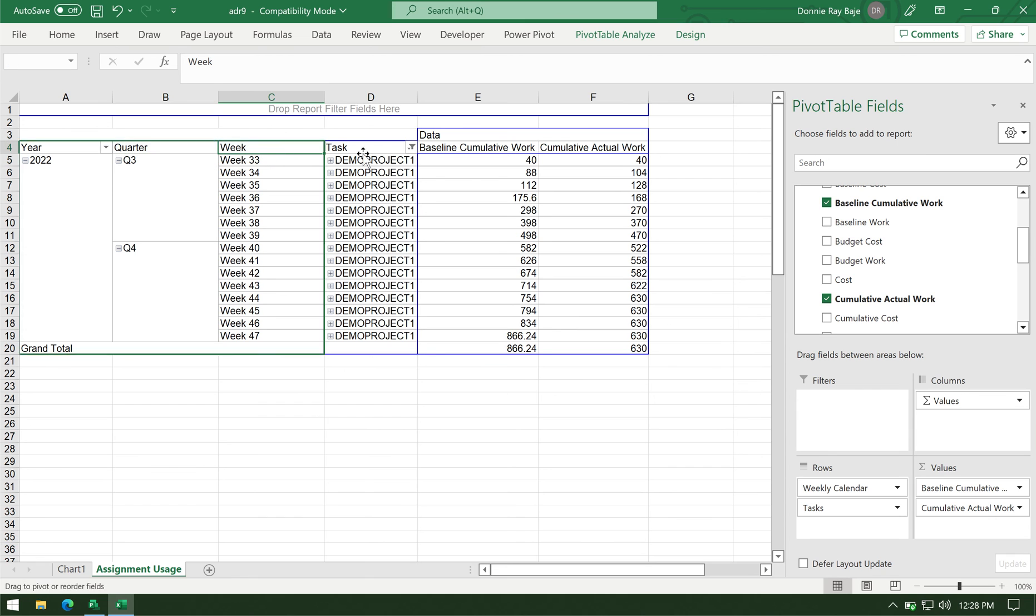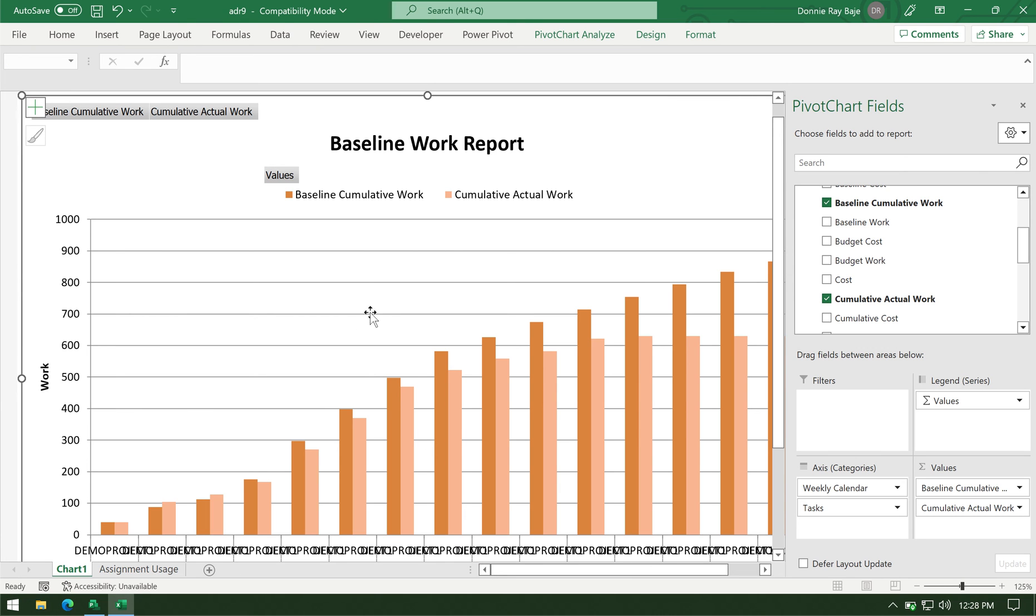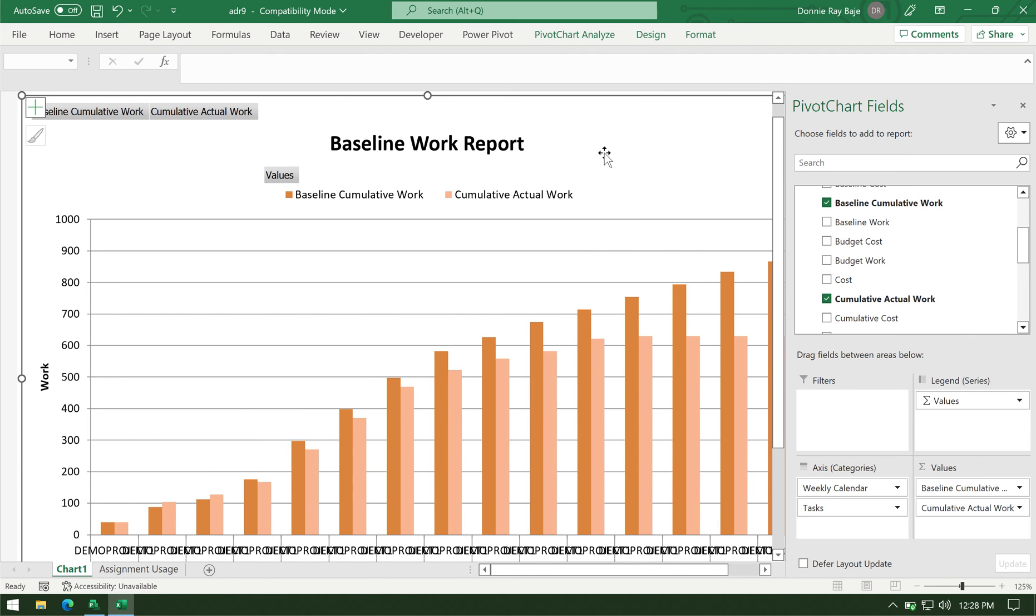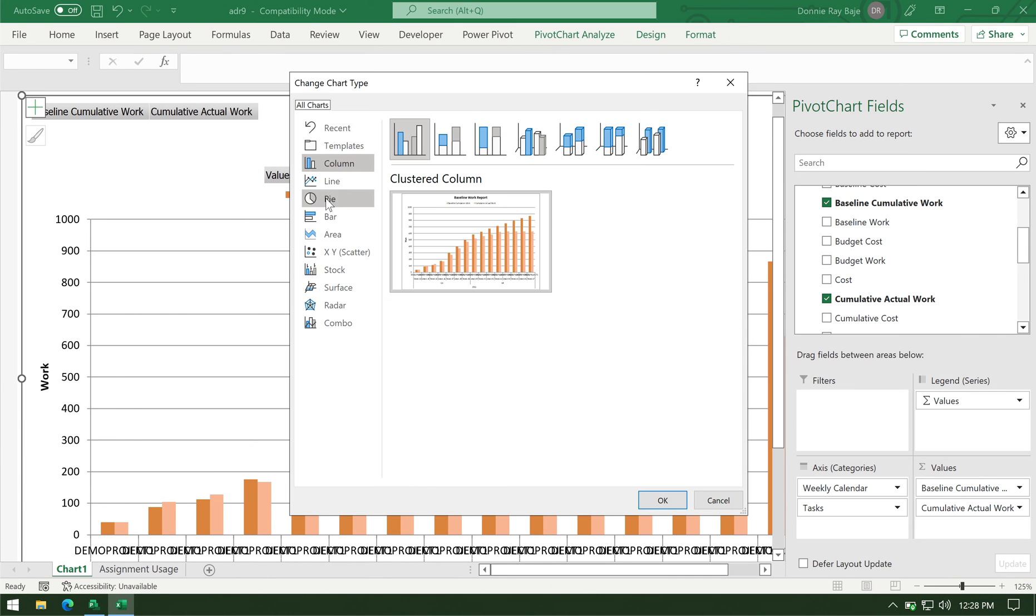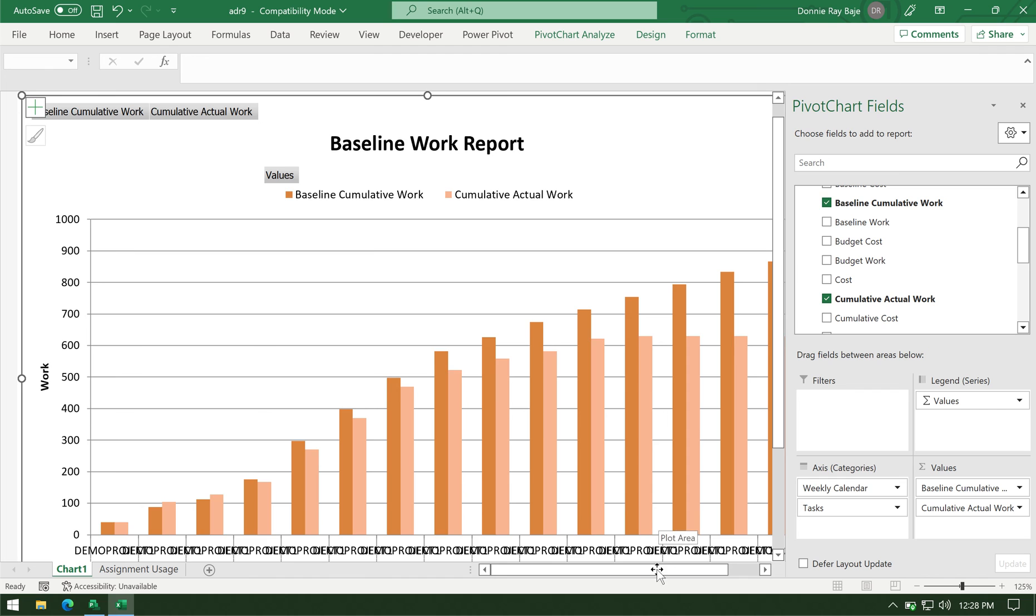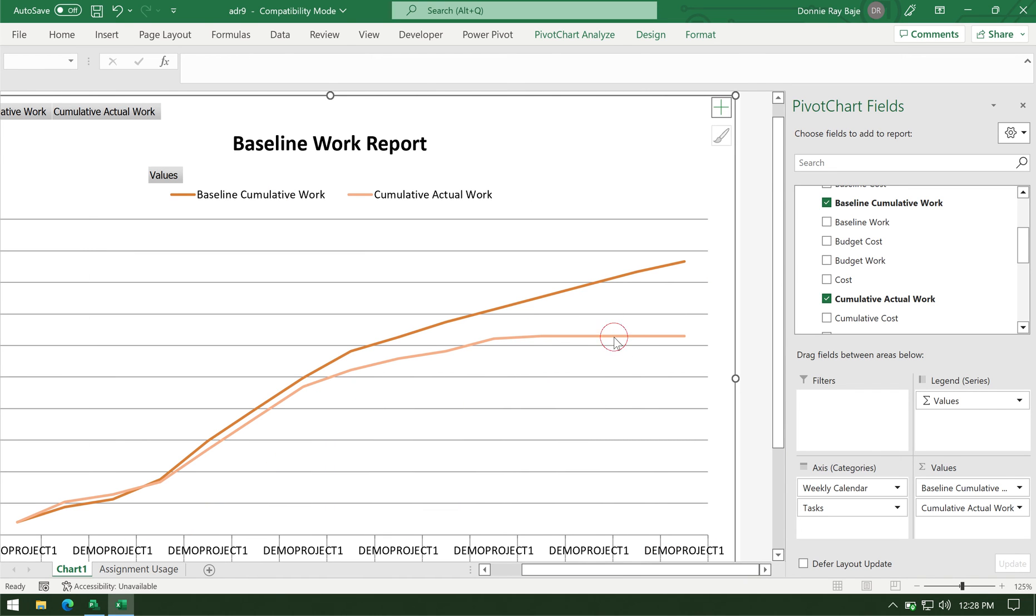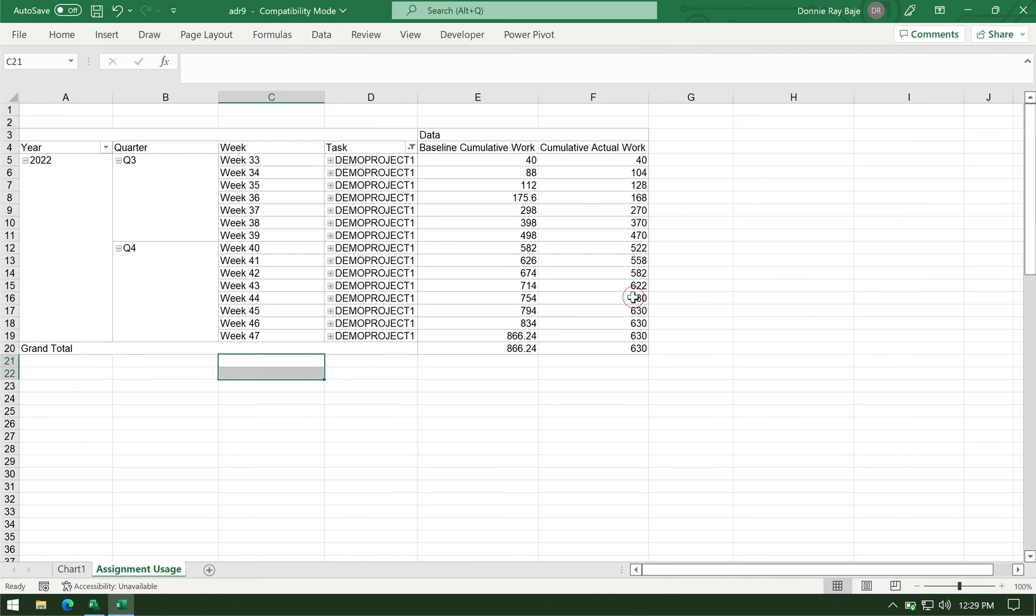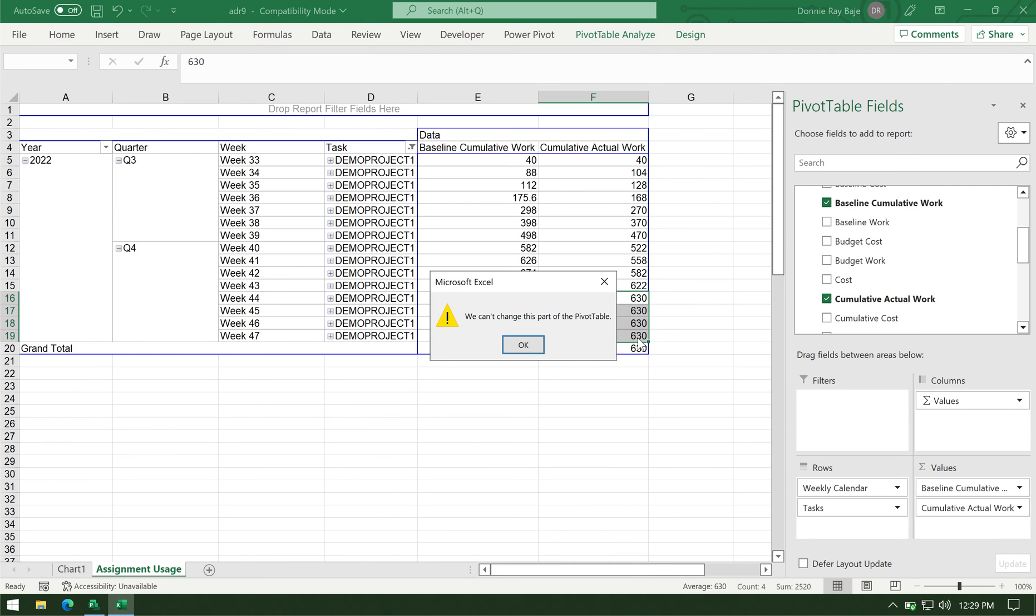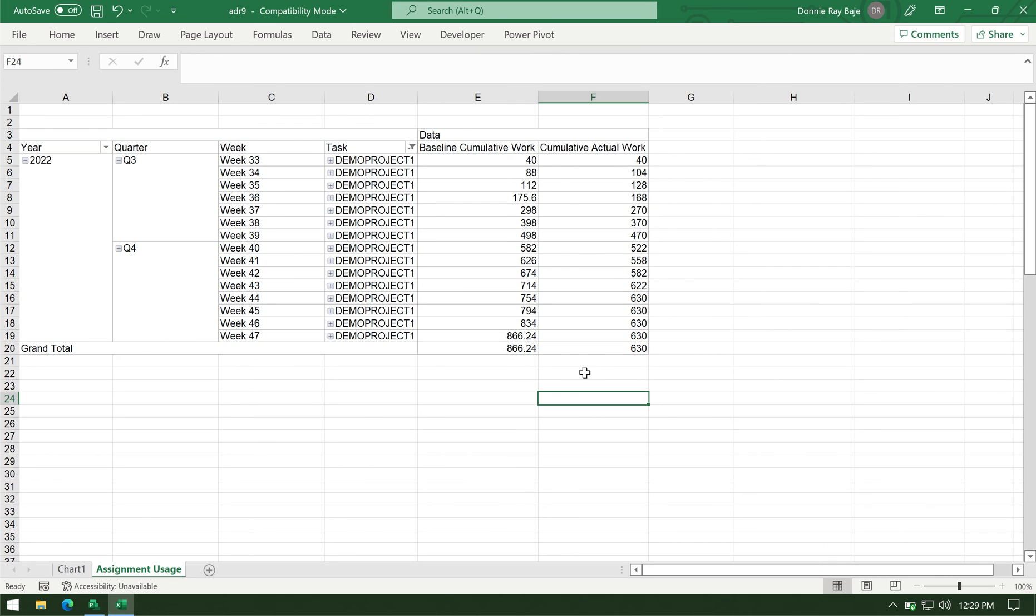So now I could copy this report to another worksheet. And if you're wondering, shouldn't we just let the chart be as it is? If you go here, you could see that the S-curve is almost there, right? You just have to change chart type and you'll see it's already an S-curve. But the problem is that the tasks that are not yet done is still plotted in my S-curve. And I really cannot delete this part because you cannot do that in pivot tables. You cannot delete data directly on the pivot table itself.